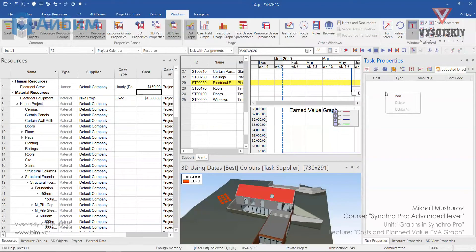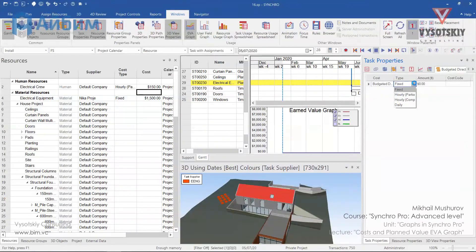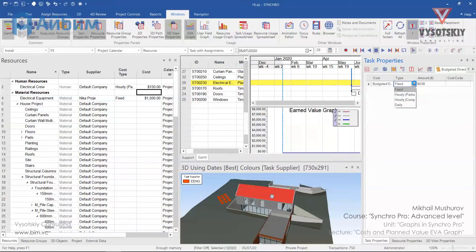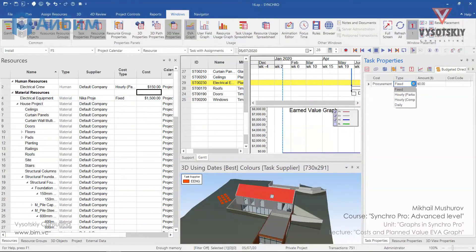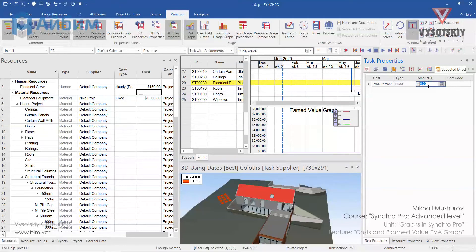Let's add a new one. They can be used in order to cost load a schedule without resource loading it or in addition to it. You can rename it as a procurement. Set its type as fixed. And the amount would be 50 dollars.